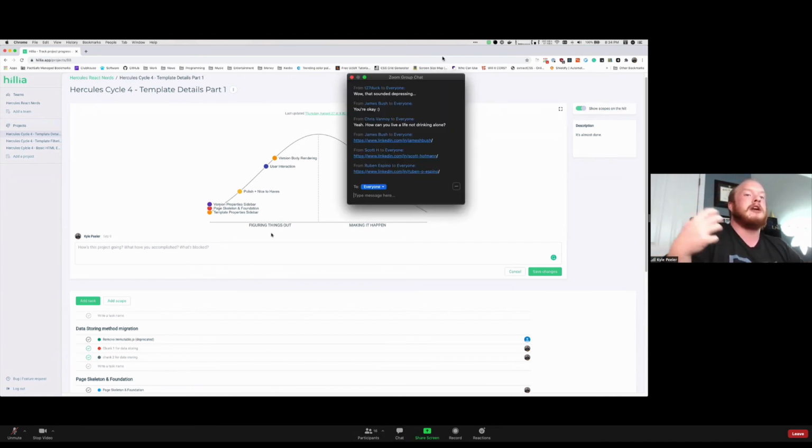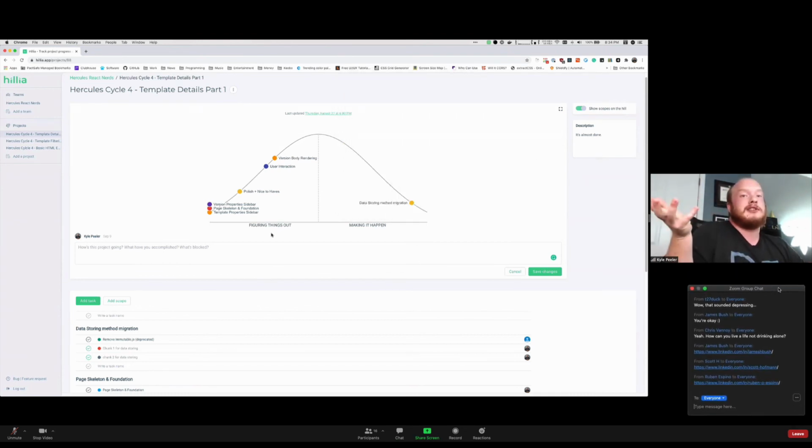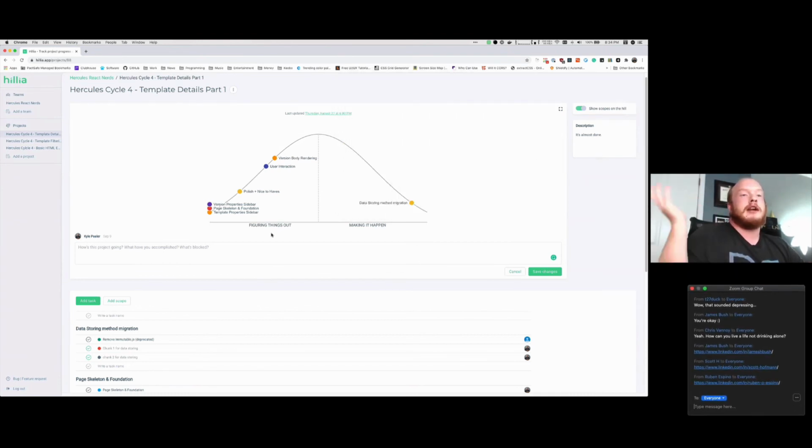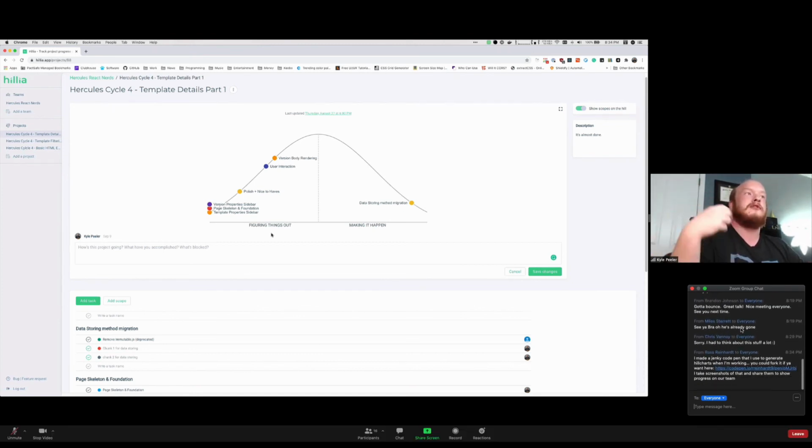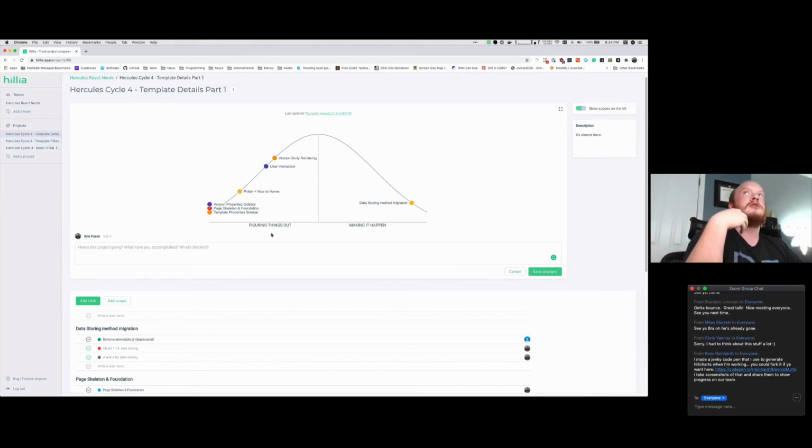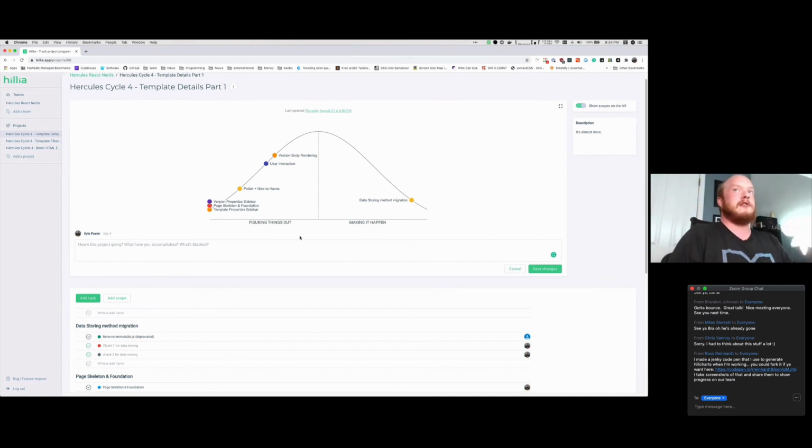And that gets you to prepare or say, okay, we're probably going to hit the 6-week limit and we're going to hit our circuit breaker. So maybe we're going to attack something different and focus on a different feature, or start to collect what went wrong. This is what I found is how you describe that throughout the 6-week period. So it's not just, all right, come back in 6 weeks, see you later. And management gets an understanding of whether stuff is going to happen or not.